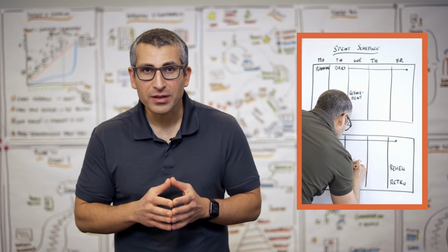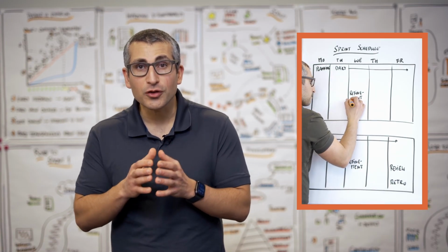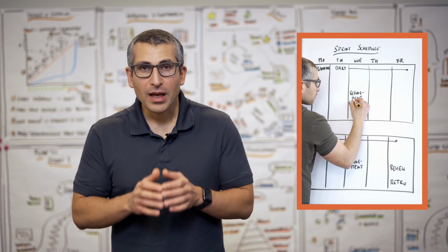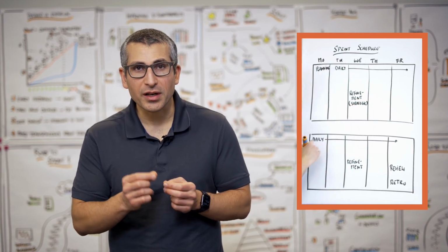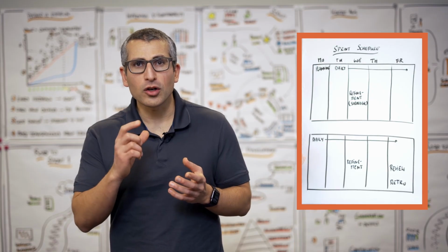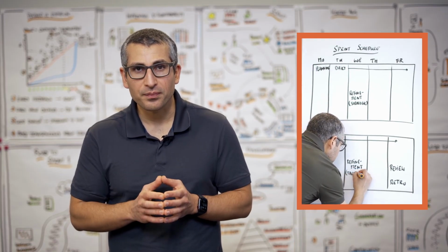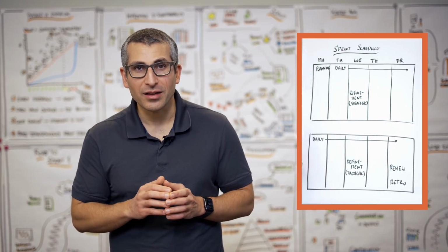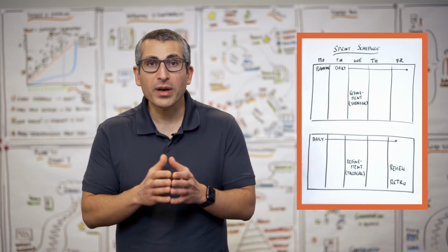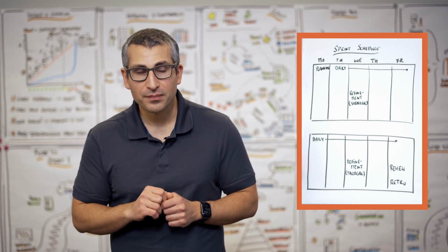In a 2-week sprint, the product backlog refinement between sprint week 1 and sprint week 2 is different. In our first week, the product backlog refinement is more strategic, which means we talk about the goals that we want to achieve and the appropriate prioritization. In week 2, the product backlog refinement is more tactical. That's when we think about how we can split those items and what kind of details we want to add.